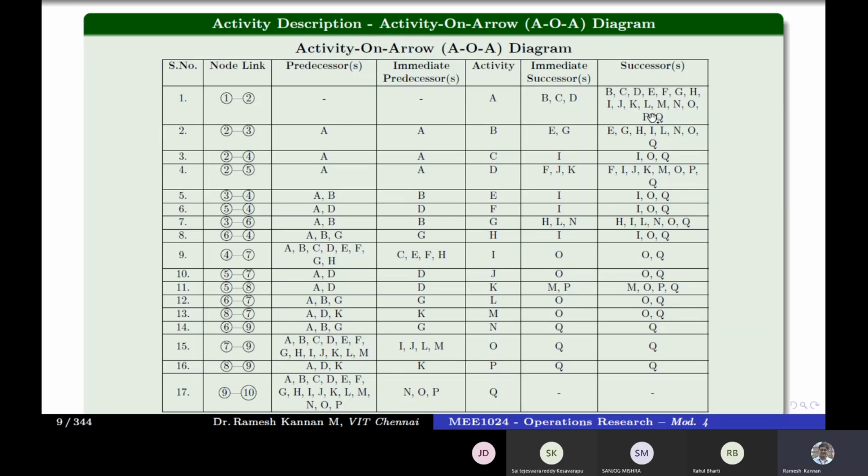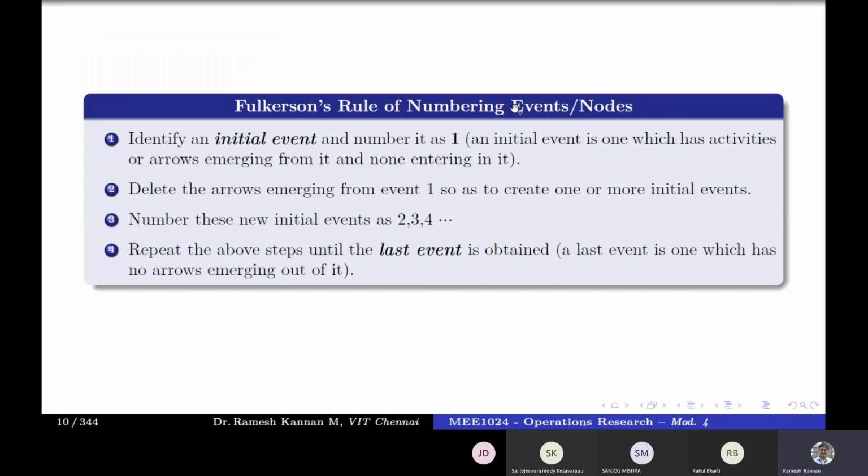So what we do is we will break down the activities and start from left to right, from the first activity to the last activity. That is called a forward pass and a backward pass. In a forward pass, we'll be constructing activity A to activity Q. For that, we will be looking only at predecessors, the preceding activities. In a backward pass construction, we'll go from the last activity to the first activity. In that case, we'll be looking at the successors. So let me demonstrate what that means.